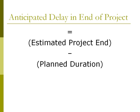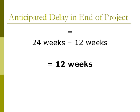The anticipated delay in the end of the project is the difference between the current estimated project end and the planned duration. As previously calculated, the current estimated project end is 24 weeks and the planned duration is 12 weeks. Therefore, the anticipated delay in the end of the project is 12 weeks.